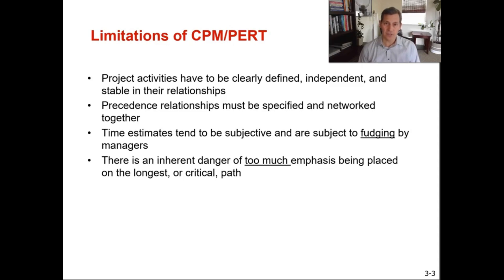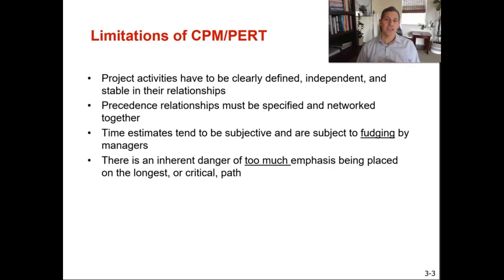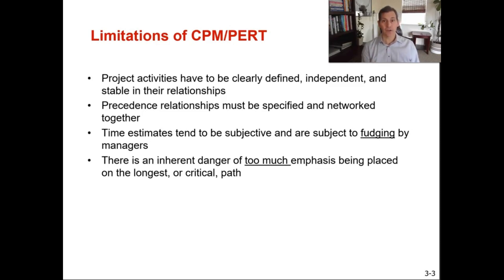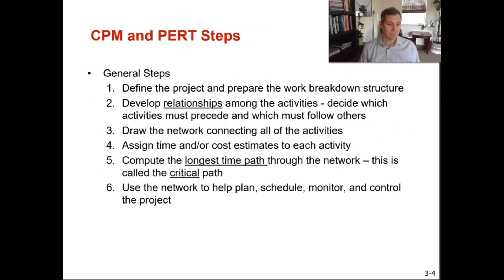Last on the slide for limitations of CPM and PERT: there's an inherent danger of placing too much emphasis on the longest or critical path. Every activity in a project has to be completed — if there are 20 steps, you have to do all 20. But if 10 of those are on the critical path, sometimes people get overly focused on just those 10 critical activities, and then the other 10 activities might slip because you're not paying close enough attention to them. That's the inherent danger of the critical path method.